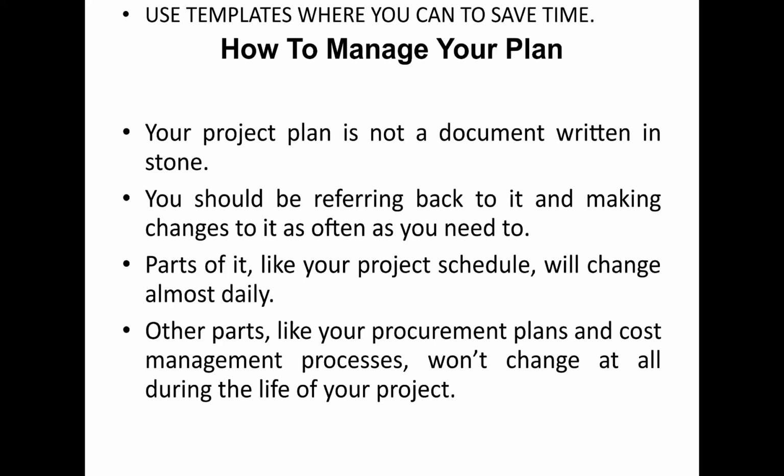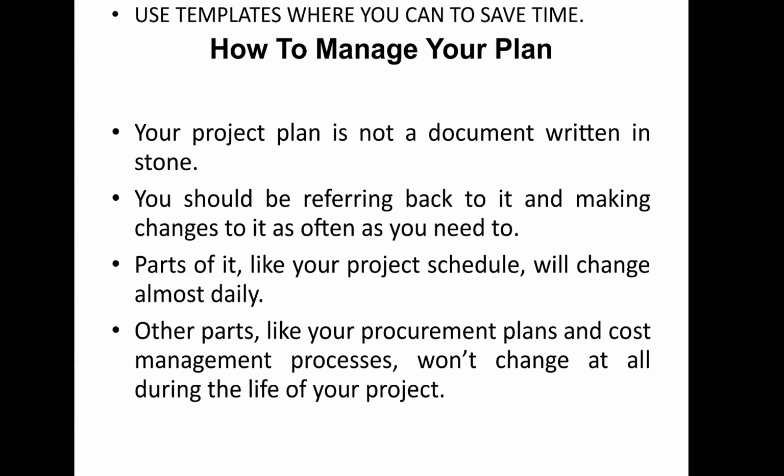How do you manage the plan? The project plan is not a document written in stone. You should be referring back to it and making changes to it as often as you need. Usually part of it, like your project schedule, will change almost daily. And other parts, like procurement plans and cost management processes, won't change at all during the life of your project.